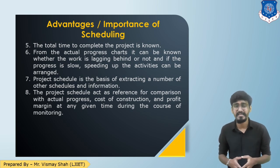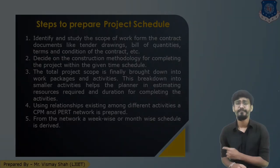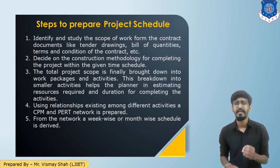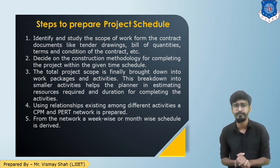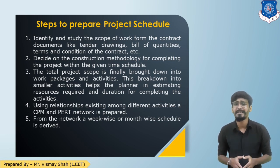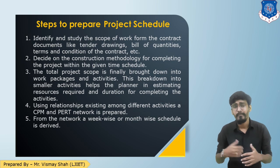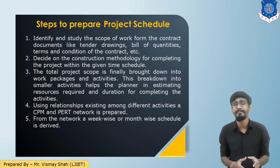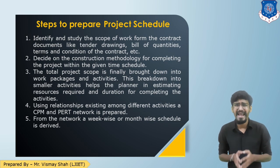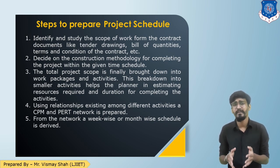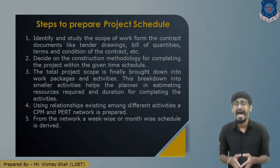Now let us see the step-by-step process of preparing a project schedule. Step one: identify and study the scope of work to be done by the construction company. Step two: decide the construction methodology within which the complete project has to be completed in the given time frame. Step three: the total project is broken down into a number of activities, events, work packages, and tasks. Based on these, the network diagram using the CPM or PERT method is prepared.